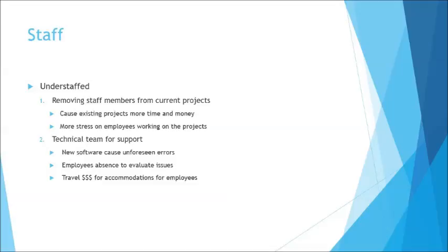The last issue I'd like to speak about in the implementation of Agile Designer is our staffing needs. We're currently understaffed as a company, as we've already noted. So it'll be a major issue for us to start removing staff members from current projects in order just to send them to training. If we do this, this will cause the existing projects that we have going to have more time delays, which again, time is money, and it will also put an even more abundant stress on employees that stay behind to work on those projects.